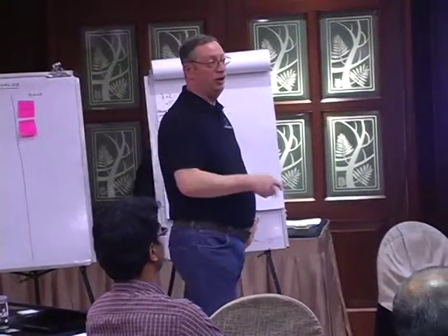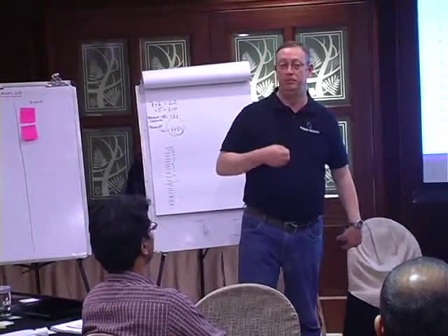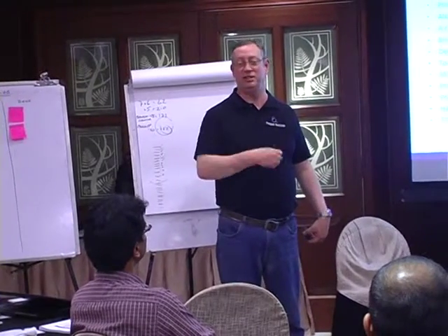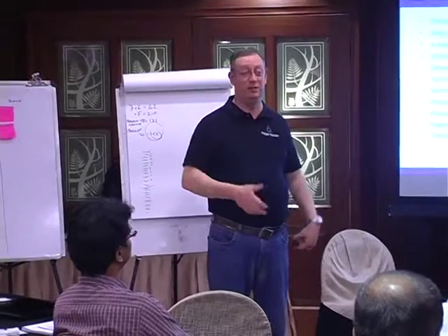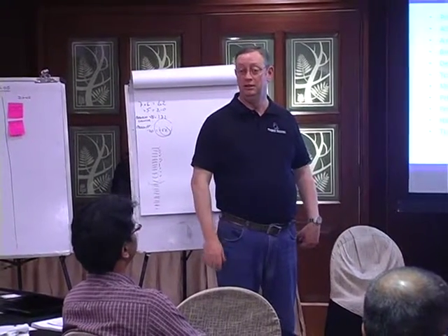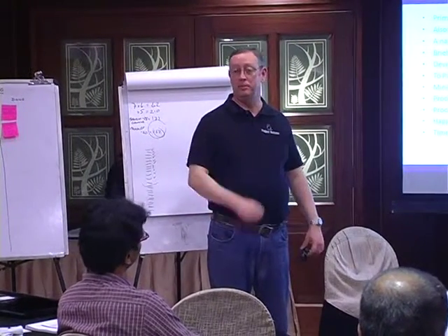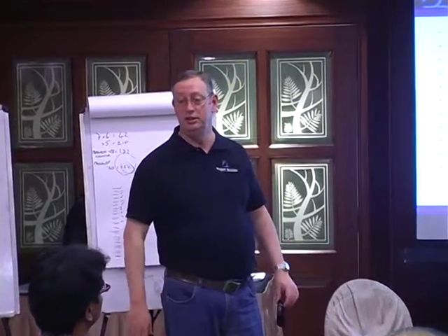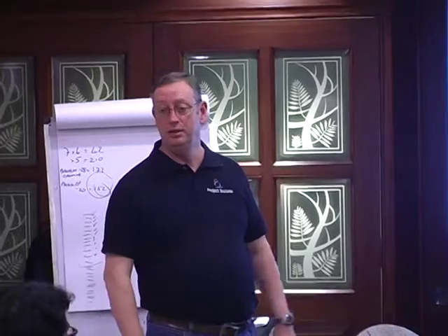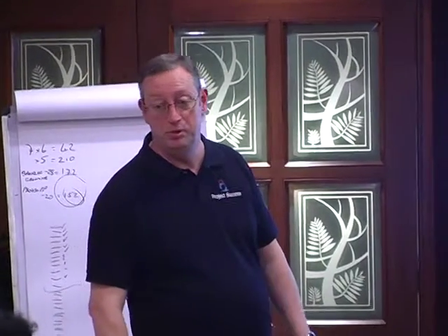You cannot expect the team to deliver against acceptance criteria that they've never heard. Because they can't. They don't know about it, they can't build it. So that just goes on the product backlog. The product owner will prioritise it, the team will groom it, and it'll be done when it's done. Any questions about the sprint review?